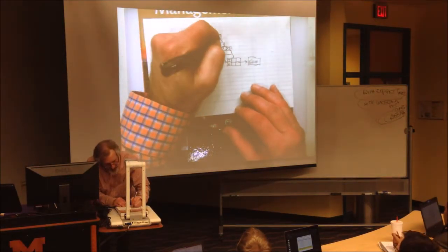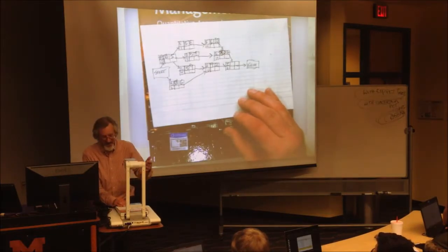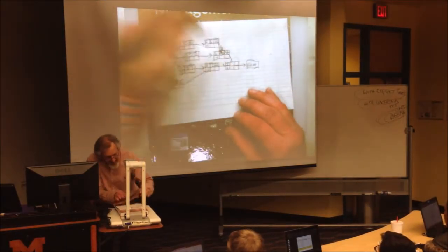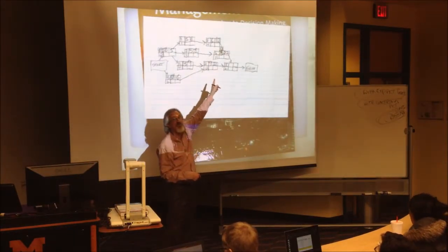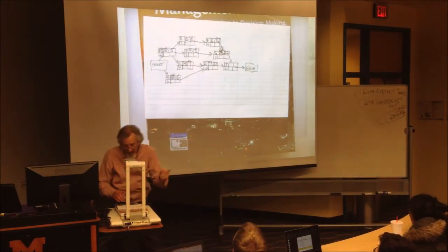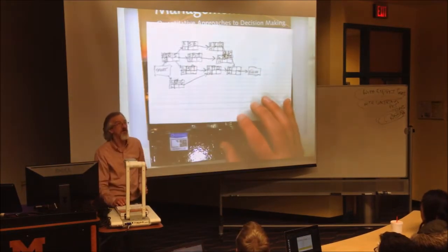You ready? So we blew up G. G should have been what? No, it already was 10, because it's preceded by F and D. 8 and 10 are our choices. Got to go with the largest number, 10. Now it takes 14. We're at 24.